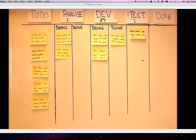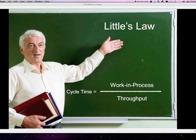And all this boils down to, for simple queues, it boils down to this theory that's called Little's Law, where you have work in progress divided by the throughput of the system, which actually gives the cycle time. So if we have 12 items in our queue or in the process, and we have an average throughput in that system of 12 items per minute, the items going into the system would stay in the system for one minute.